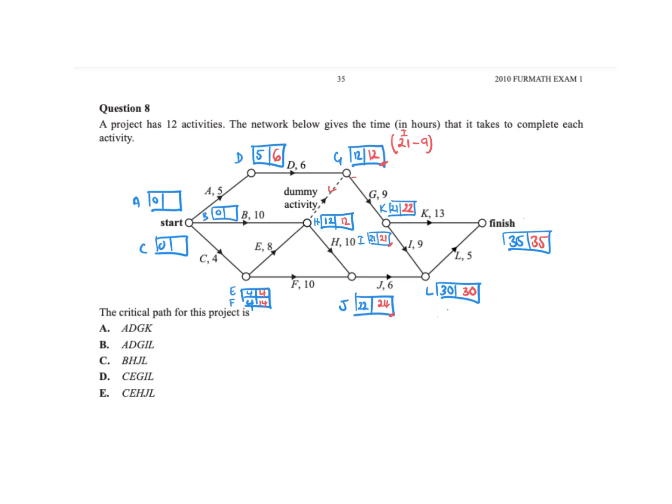No, we're still looking at red numbers. So here I have to use 4 because 4 is the smallest. So 4 minus 4 going C would be back to 0. If I went along the B, I'd have 12 minus 10, which is 2. So there's that float time. And if I went along the A, it'd be 6 minus 5, which is 1.